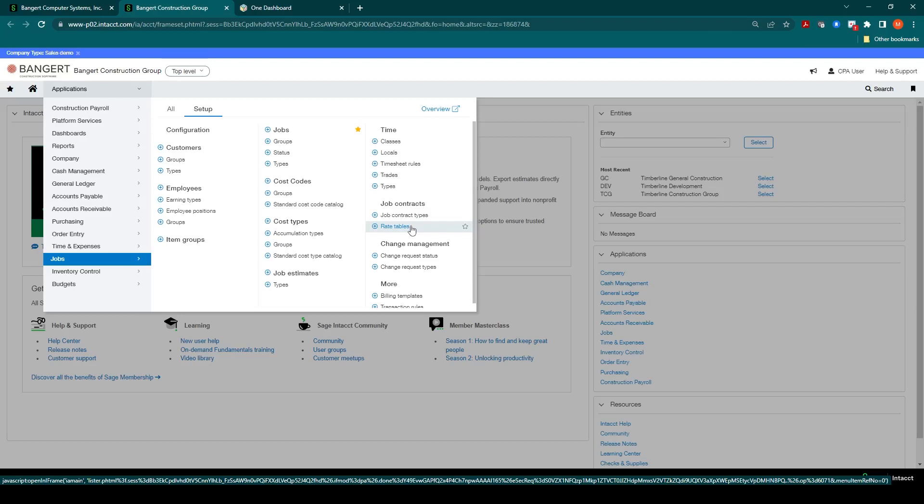You can also enable retainage tracking through the system and can have the system automatically hold back retainage during invoice generation and then also generate separate retainage invoice billings.